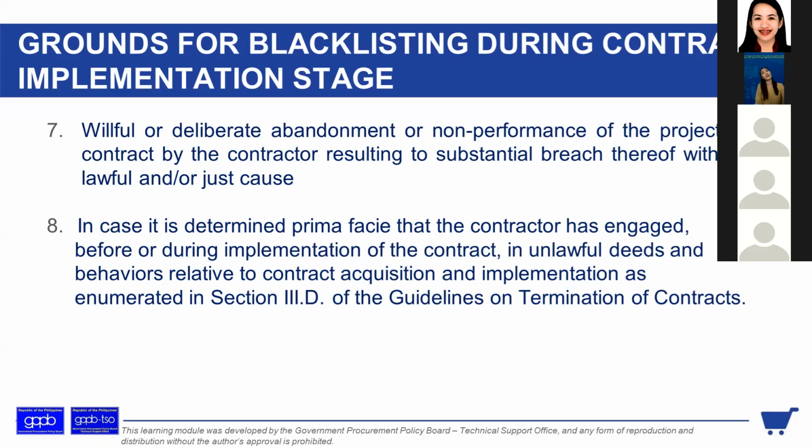It pays to be friendly with other government agencies. Try to check with DPWH, because DPWH has a lot of projects with different contractors, so they have more knowledge of who has many projects. Then call their previous agencies where they had projects, and ask whether they really finished and whether there were complaints. If they had problems there, most probably they already have a history with other agencies. So it's due diligence.